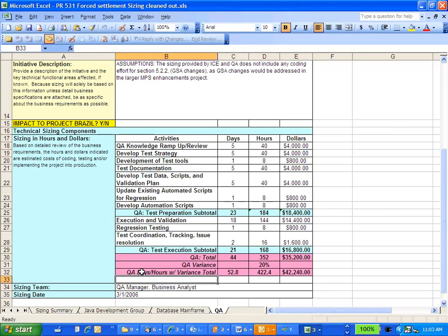To do estimates, a PM or a BA just calls a meeting, so he doesn't have to describe the same project to 10 people at different times. They set up a call, the various functional leads and technical leads join, they ask questions back and forth, and then they all go back and send their answers to you by email. Then you just compile all the answers and send it to the business team. Simple. Common sense, no?